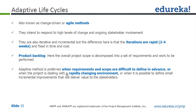The adaptive method is preferred when requirements and scope are difficult to define in advance, or when the project is dealing with a rapidly changing environment. Agile is getting a lot of traction for these reasons. It is also preferred when it is possible to define small incremental improvements that deliver value to stakeholders. The good part is ongoing stakeholder involvement ensures immediate feedback — you don't have to wait two to four months as in iterative work.